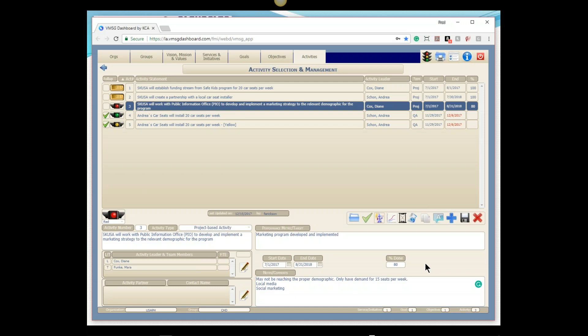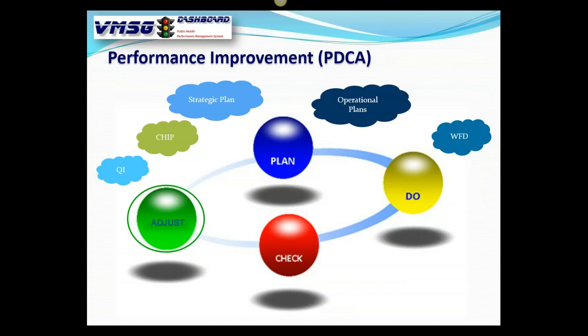At this point I'd go to the PIO office and explain: we agreed 20 was the target for our geography but we're only running at 15 — can you give me insight? One answer might be: John did the analysis, picked neighborhoods within the financial demographic, did social media and regular media marketing, and we think we're doing a great job — we may have just overestimated the target number. In that case we'd make an adjustment to the plan, take it down from 20 to 15, go through the cycle again, and check next quarter.